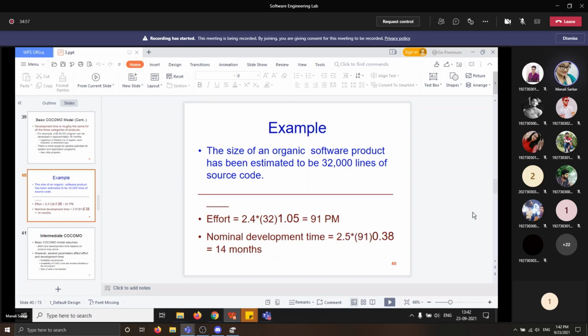Another point that should be carefully remembered while doing COCOMO is that from the effort estimation for a project expressed in programmer-months and the nominal development time, the novices would determine the staffing level by a simple division. However, we are going to examine the staffing problem in more detail. This simple division approach to obtain the staff size is highly improper.